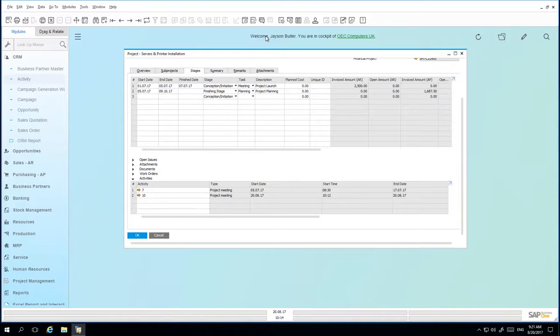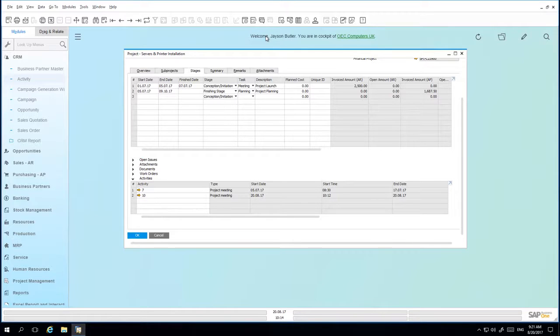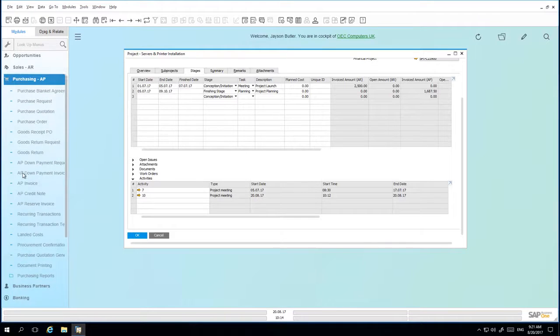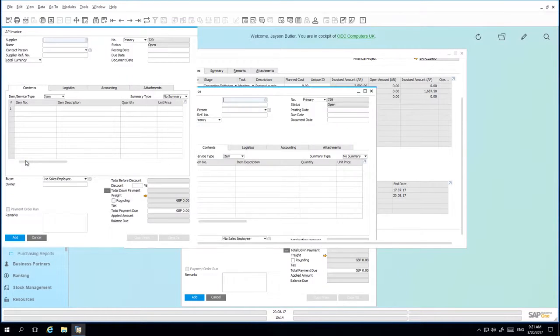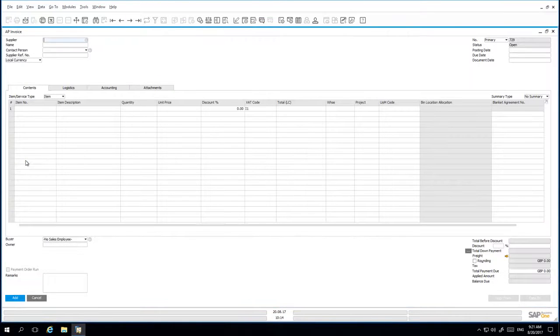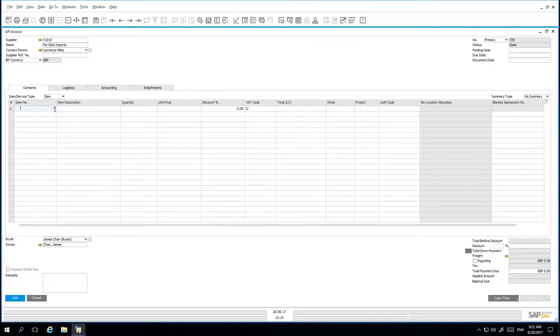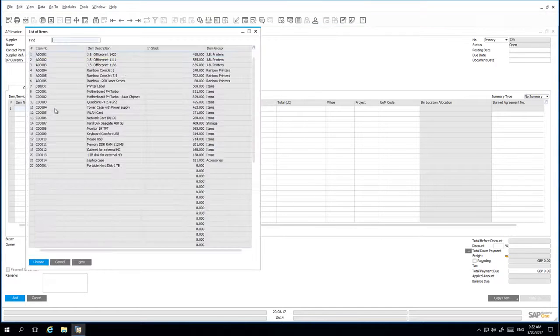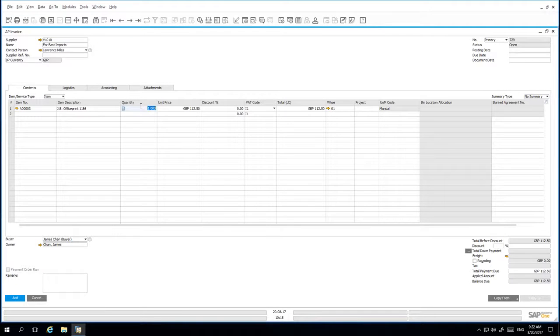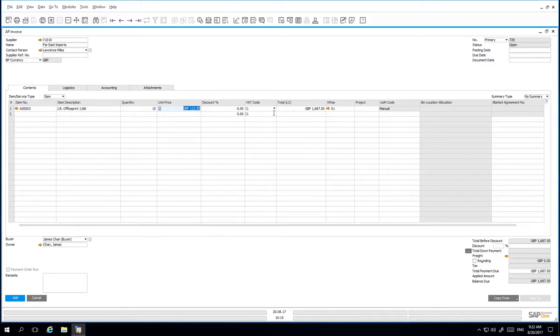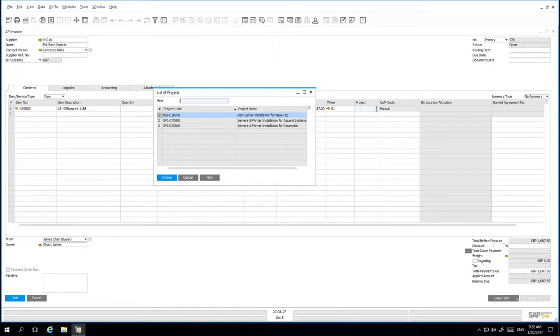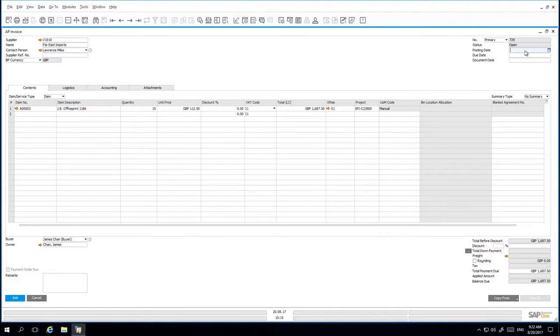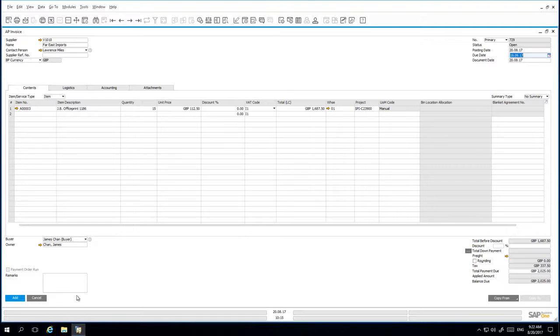We are now going to create a purchasing invoice for the printers that are needed for the installation. So to do this, we're going to navigate to the purchasing menu. And then we're going to select AP invoice. We select our relevant supplier and the item details. In order to link this particular AP invoice to the project, we now need to define project details. We enter our posting date and add the AP invoice to the system.